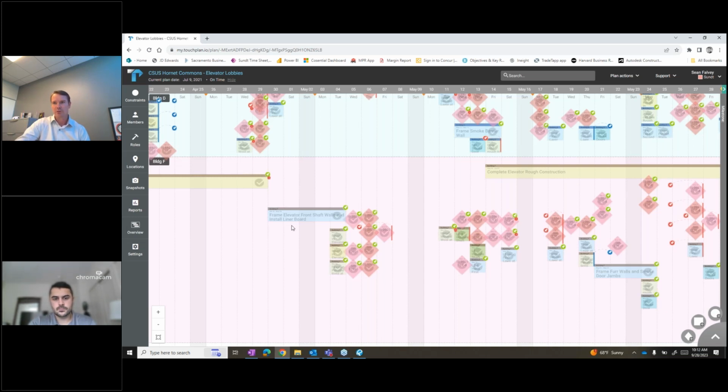So right in front of you here, we've got stacked work, trades working effectively on top of each other on one day, which we were able to work out through that efficiency. But then right after that, we've got layers and layers of inspections in order to free up the next task. So this was an extremely laborious process of, one, getting, call it, an hour to 2 to 3 hours worth of work done, and then 3 or 4 days of inspections.